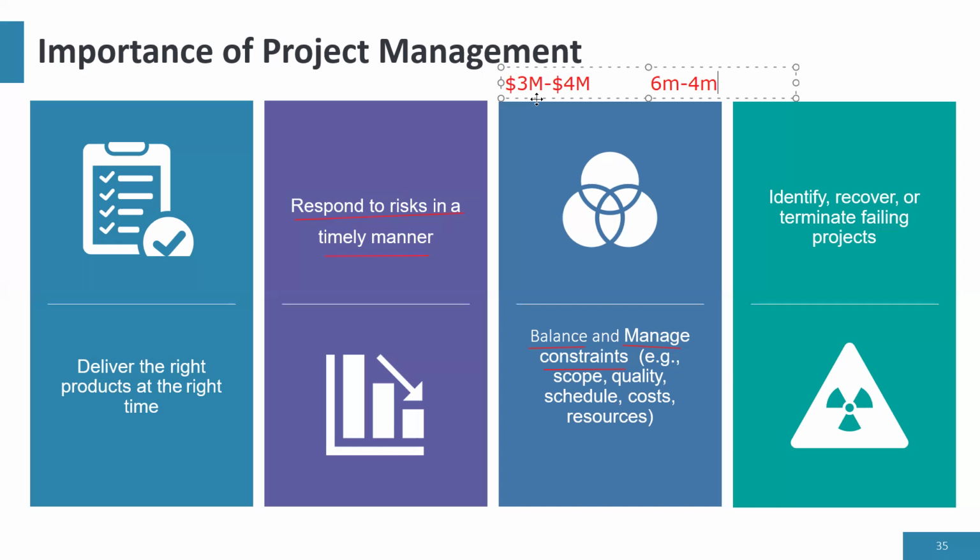So what comes in here? I look at maybe our subcontractors, whomever we contracted to get the things done. If there is need, another thing we could do is incentivize some of these people. Normally, maybe for people that deliver steel, as the case may be, some of them normally deliver in maybe 2 weeks, I could say, okay, fine, for extra incentive, if you could deliver this on time, we're going to give you extra. So that is an incentive for people to actually do what they ought to do. And if it needs hiring more people to get this done on time, or working 24 hours, as the case may be, to get it done.